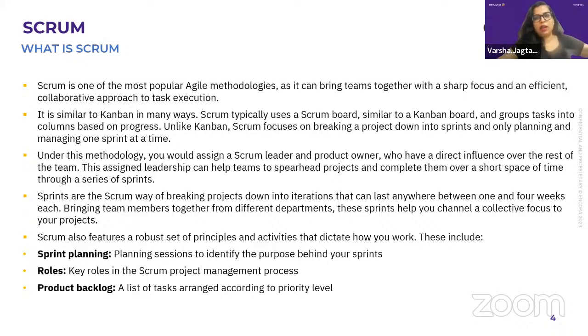So how are we managing that using a sprint? So generally in Scrum, what happens? I would fix this time frame, which is called a sprint, and which is 2 weeks. So I need to tell the product owner, or maybe whoever is the actual client or end user, that in a 2 week time, maybe I can complete only authentication.